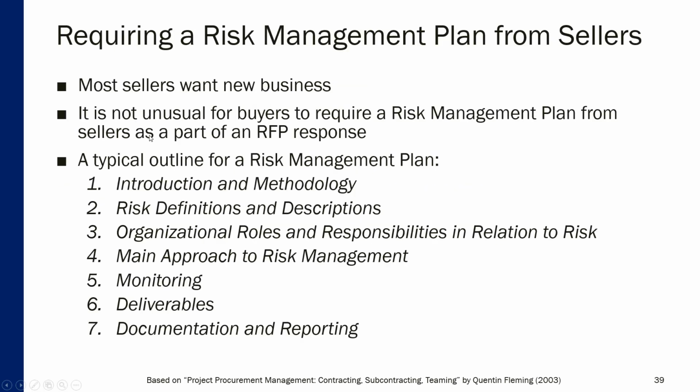Now, regardless of which strategy is used, nowadays a lot of organizations are requiring their vendors or sellers to participate in risk management. Most sellers want new business. Most industries are competitive in a sense that sellers or vendors are competing for clients. So it's not unusual for buyers to require a risk management plan from sellers as a part of an RFP, request for proposal, response. And here you have a typical outline for a risk management plan that a vendor must submit as a part of their response to a particular contract that is posted by a buyer.